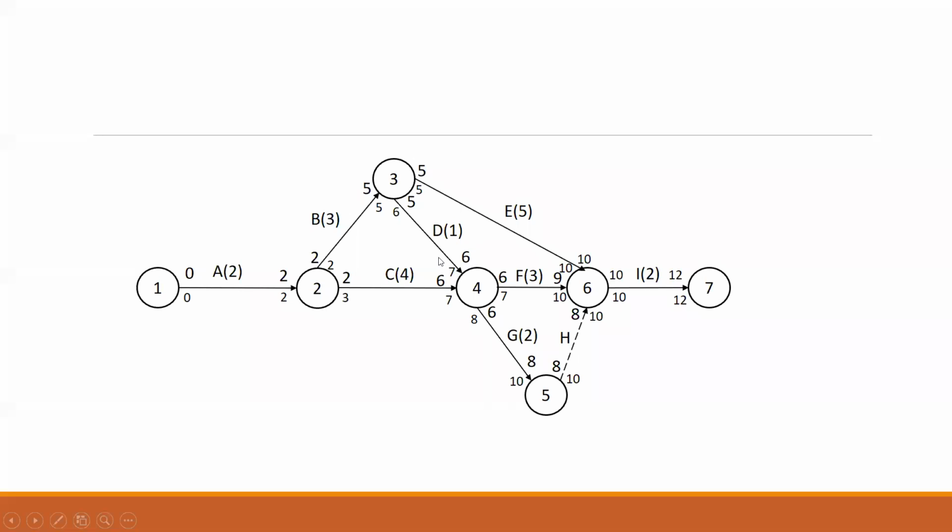Okay. Now there are two arrows which are merging into this node. So here we have 6 and this is also 6. So there is a tie here. Actually, we are supposed to take the value which is maximum. Because it is the same, we have taken 6 here. Okay, and we put 6 here as well. 6 plus 3 gives you 9, whereas 6 plus 2 gives you 8 here. Okay, now node number 6 has some values here.